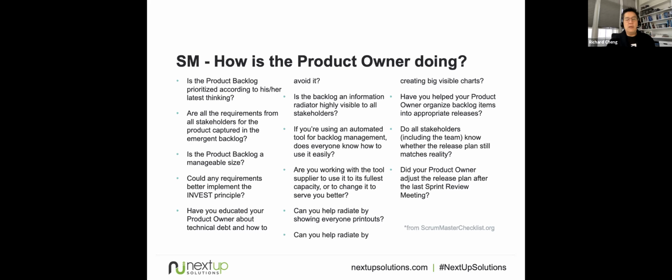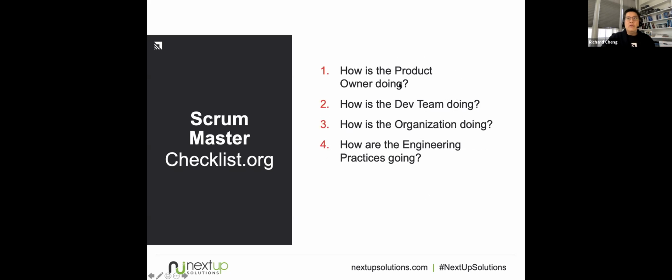Product owners generally may have never worked with a product backlog or a sprint backlog or burndown charts before, right? And so it's the Scrum Master's job to really help the product owner understand how to be a product owner, how to do refinement, how to create vertical slices, how to create user stories that are completable within a week or less, right? That isn't necessarily stuff the product owner knows day one. So as Scrum Masters, our job is to help the product owner do that, right? That's very time consuming. Every place I've ever been as a Scrum Master, I end up having a deep relationship with the product owner just because I work so closely with them, right?